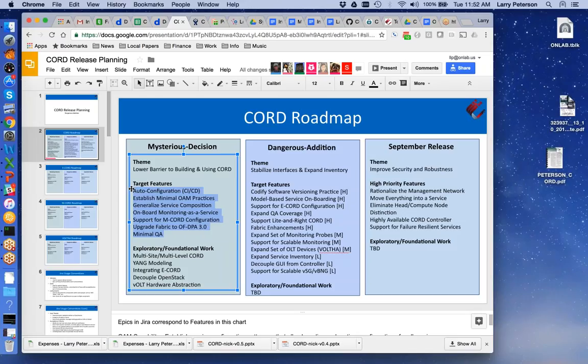Yeah, I mean, there's one or two epics that correspond to every one of these features. And each one of those epics has a set of stories that are anywhere from 10% to 90% completed. The objective should be to get each feature into a viable state, define what that state is, and get it to that viable state.